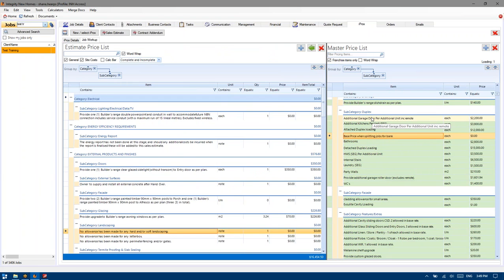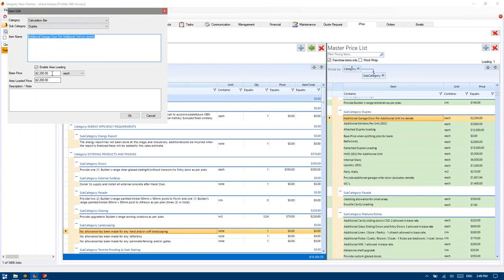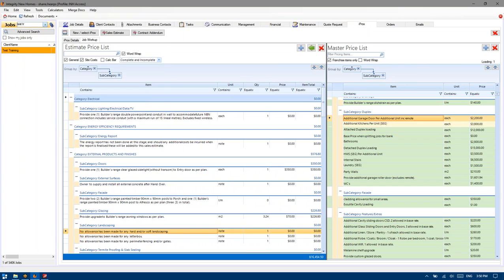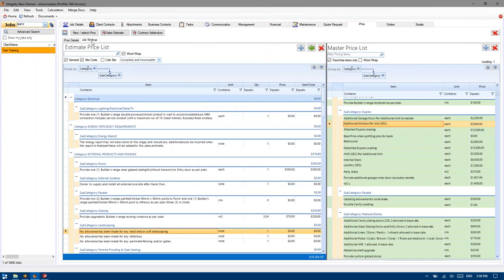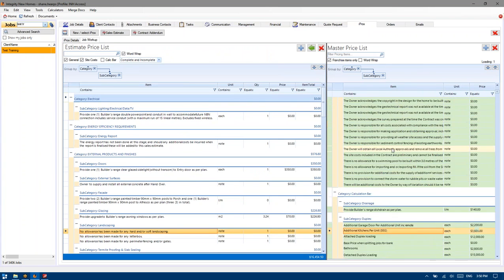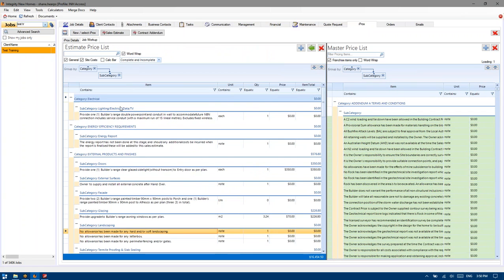Not dissimilar from these excess kitchen values where if you use less than what is allowed, you don't get a credit. We don't believe in many markets you'll find these products cheaper than what we've put in. If you do believe that you can source a product and supply and install it for a value less, then we encourage you to copy that item by right-clicking and going copy, adjusting the price and hitting OK, and then it will appear in your database at your preferred price.